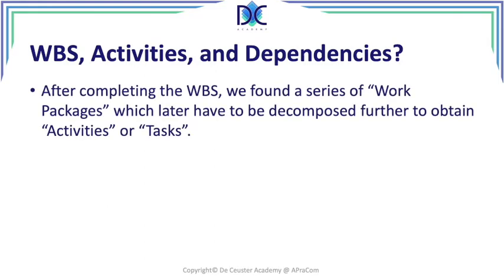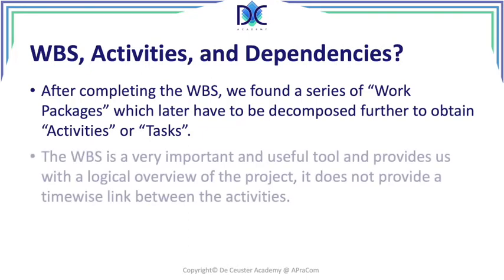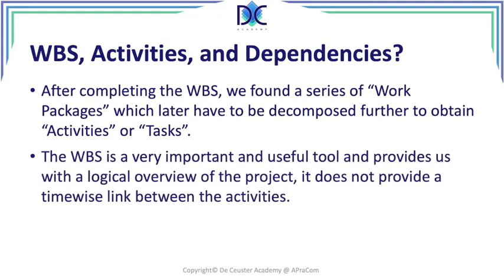So let's have a look. So what happens once we finish the WBS? The end of the WBS, according to PMI terminology, is when we reach the level of work packages. Those are groups of activities which can be estimated independently, which can be executed independently, which can be done by one team. Now, in many cases, when we have larger projects, these work packages are basically also mini projects, and we have to decompose them further up till the moment we reach the level of activities or